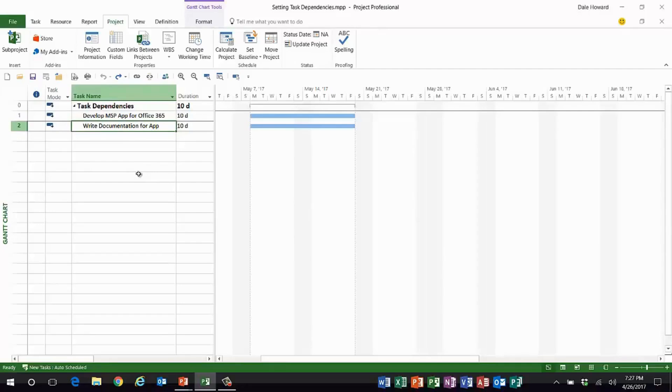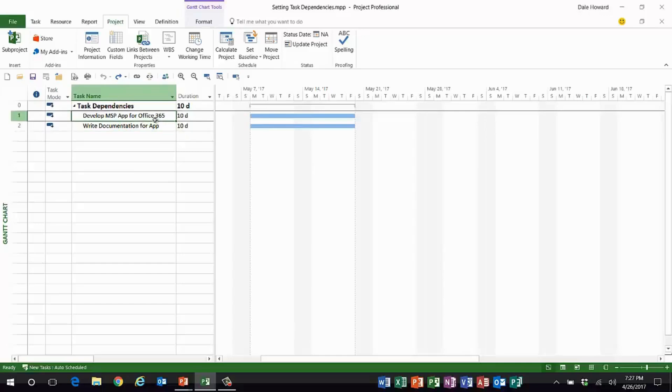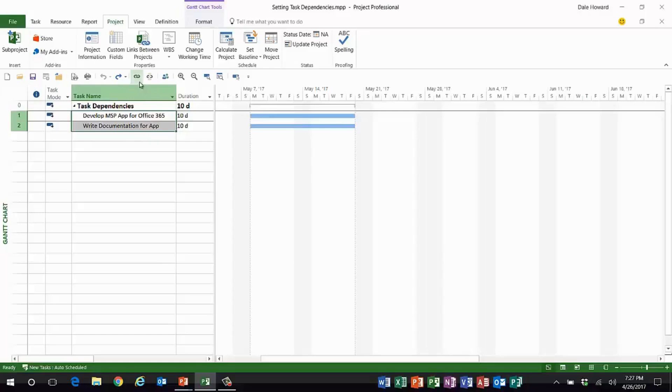The relationship I'm looking for here is start to start. That's the basic relationship, there's more to it than that. I want to show you my favorite way of setting task dependencies including how to do start to start, finish to finish, and start to finish. The same technique will work in all three situations.